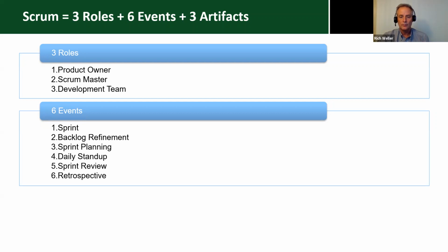Our daily Scrum, that's where we come together, same time, same place. All the team is there. And that's where we are basically doing our daily planning or our daily replanning and sharing with one another where things are at. Answering those 3 questions. What did you do yesterday? What are you going to work on today? And do you need help in any way?